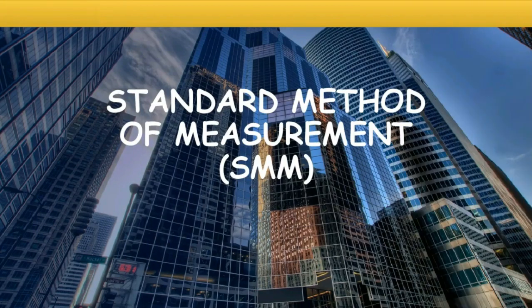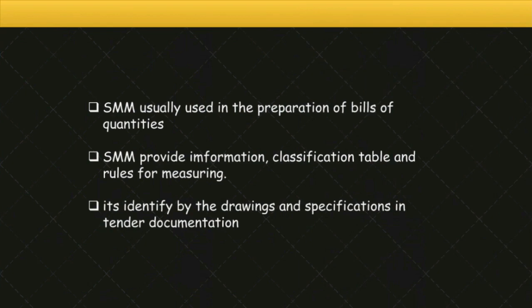Standard method of measurement (SMM). Standard method of measurement is usually used in the preparation of bill of quantities. SMM also provides information, classification tables, and rules for measuring. It is identified by the drawings and specifications in tender documentations.